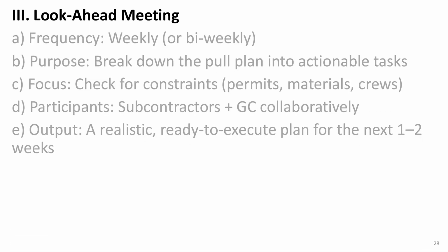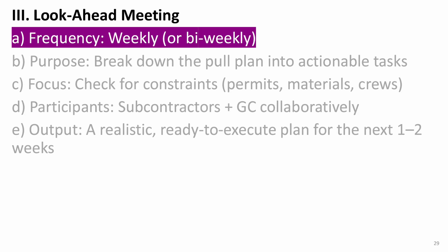Once the pull schedule is in place, the next step is to build a look-ahead schedule, typically covering the next 1 or 2 weeks. This step is critical for turning the broader plan into detailed day-to-day actions on site. These look-ahead schedules are usually developed on a weekly or bi-weekly basis, often during planning meetings at the end or start of the week.